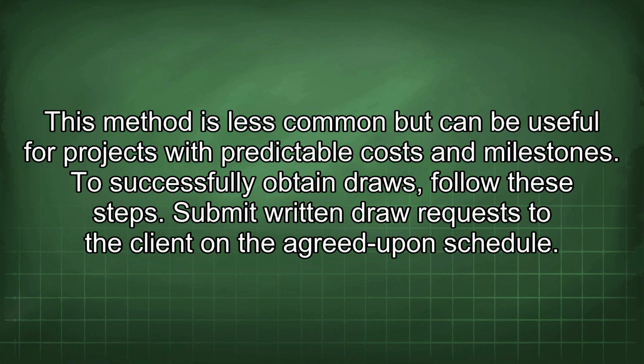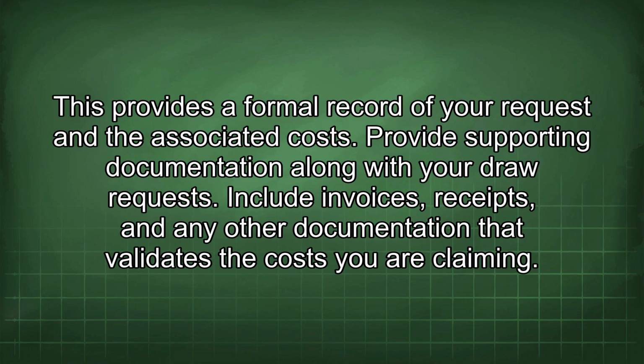To successfully obtain draws, follow these steps. Submit written draw requests to the client on the agreed-upon schedule. This provides a formal record of your request and the associated costs. Provide supporting documentation along with your draw requests. Include invoices, receipts, and any other documentation that validates the costs you are claiming.